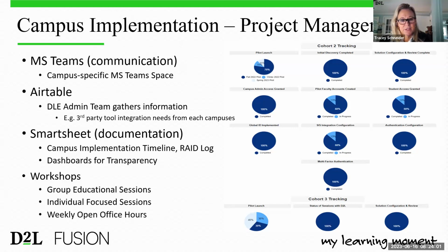So we leaned on tools like Airtables. We had so many schedules to manage. We used tools where both organizations could own and update their own pieces. And then everyone understood the status of where we were at. And then we built automated dashboards based on those schedules to provide transparency to key resources that were easy to understand. So no one needed to know how to read a Gantt chart.